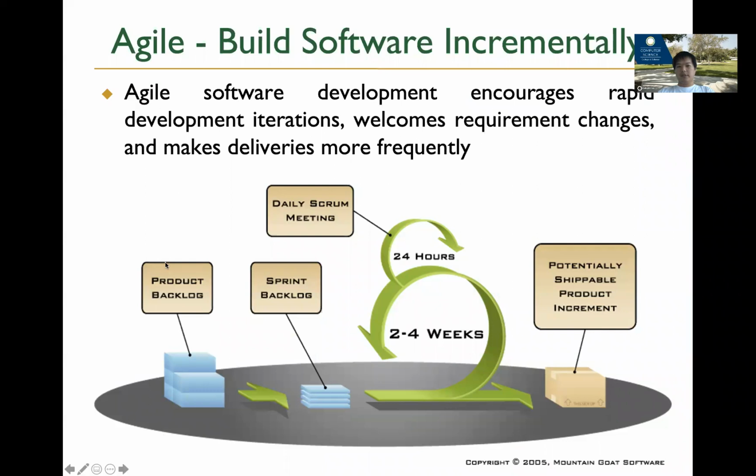For Agile, we break down your big cycle into smaller cycles. As I mentioned, every cycle we call a sprint. That's a term, and every team can decide how many weeks are in the sprint, but normally it's 1 to 4 weeks. When I was at Amazon, some of the bigger teams used a 3 week sprint. Some smaller teams used a 2 week sprint. If it was a new product, they actually used a 1 week sprint because they can write more code and do more features within 1 week.